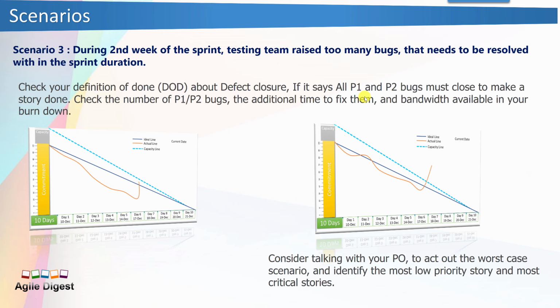there at the time of commitment or development, that doesn't get changed, because I saw many teams or many product owners change the acceptance criteria or requirement even after the story is committed, and those actually cause these kinds of problems. So the number of defects you are seeing here, that's not a very ideal case, but it's not impossible.